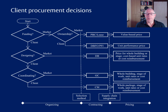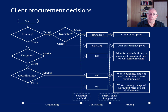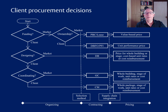The start point is to ask the first question: where is the funding coming from? The left-hand side of the graphic is marked out as decisions relating to organizing the project. The first thing is to ask ourselves, as a client, where's the funding going to come from — do we want the market, the supply side, to fund the development and then we engage with it, or do we want to fund it ourselves as the client? If we take the answer that we want the market to fund it and don't want to pay upfront, then the question becomes about ownership at the end of the process.